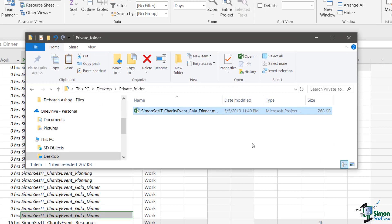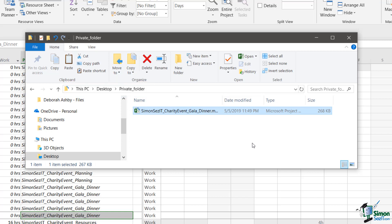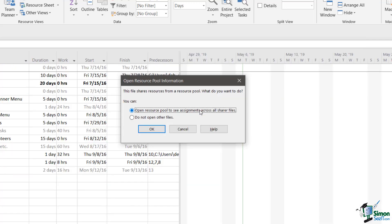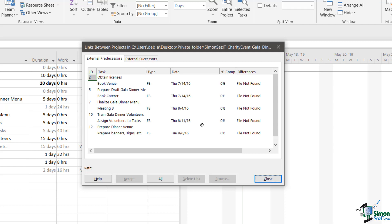So, what we have here is the gala dinner project in a location where the resource pool, the shared resource pool, is not visible. So, let's see what happens when we open the gala dinner project. Now, of course, project 2019 knows that this project shares a resource pool and has actually tried to find that resource pool. So, in this case we don't say open resource pool to see assignments across all sharer files, we just say do not open other files. So, it's worth noting that that doesn't mean that this project has fundamentally stopped sharing resources, it just means we're not going to look at them at the moment.